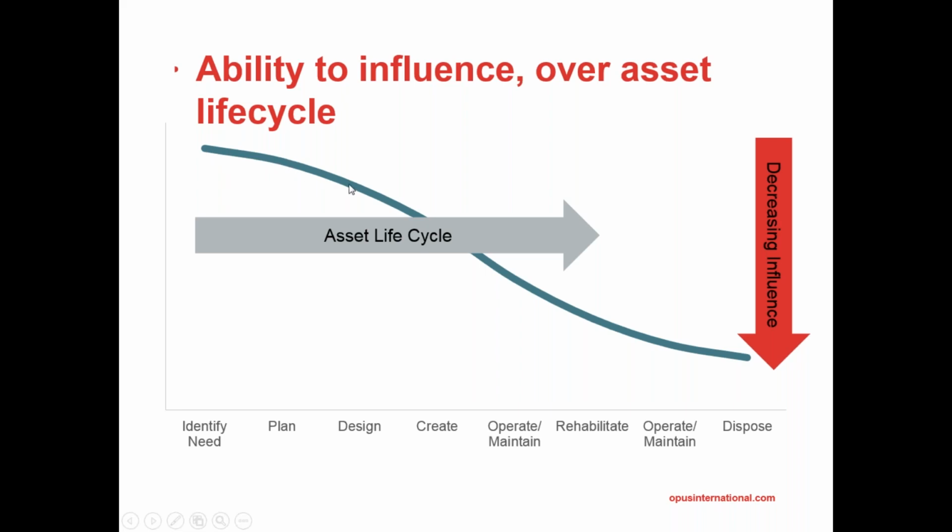But once you've committed to a particular asset or a particular solution, then quite quickly, as you can see, you go from planning to design. Once you've already designed something, your opportunities for the costs and performance of whatever you're going to be creating are reducing at every stage. Just another way of showing that.